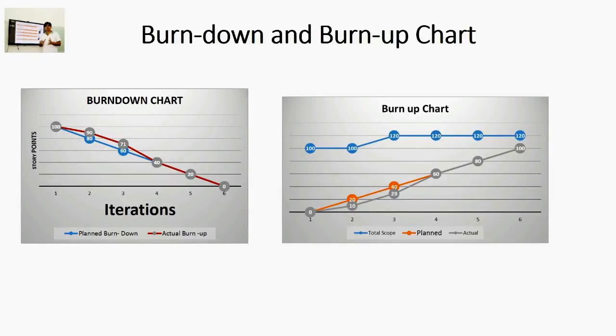In agile projects, information radiators are highly visible displayed techniques used to track the status of the project. An information radiator can be in the form of a chart, summaries and graphs related to the project. Some examples of information radiators are burn up charts, burn down charts, trend charts for velocity, story maps or product road maps.